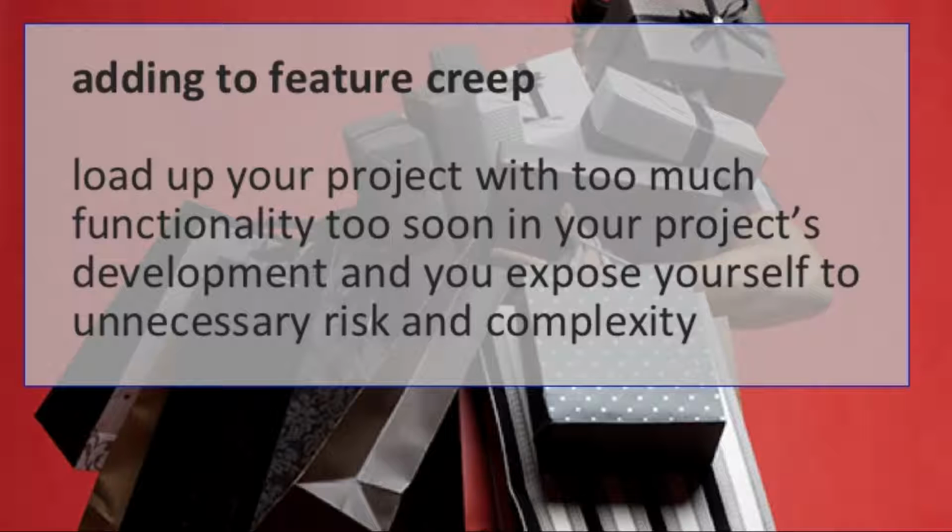But the hybrid methodology, where you can do a little bit of connecting the different dependencies, certainly, but also have organized sprints and iterate and provide some functionality, gets folks thinking in terms of building a website or a web application in different phases, right? Because a sprint is a phase. And then they get to see that functionality, right? And then it allows them to really get their minds and their arms around a minimum viable product,